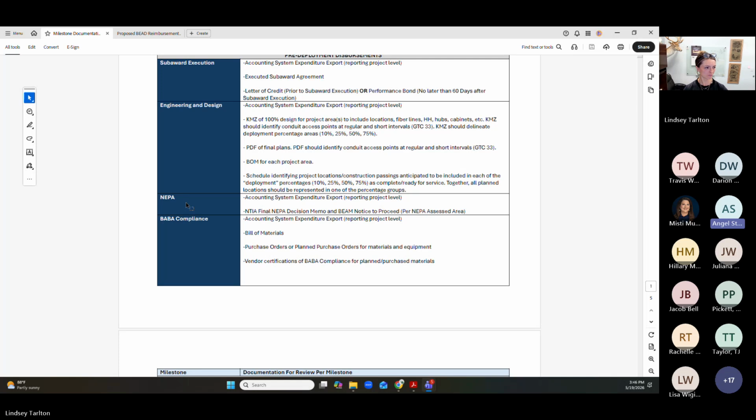I think let's pause for questions, let people digest for just a second. But we do have one question in the chat. Pamela asked, did the Mississippi Permitting Roundtable satisfy the 811 meeting requirement, or does each BEAD awardee need to meet with 811 individually? The answer to that is it does not satisfy your requirement as an awardee to meet with 811. The Permitting Roundtable satisfied a requirement that NTIA made on us, the eligible entity, that we have to make efforts to streamline the permitting process and hold some permitting roundtables.